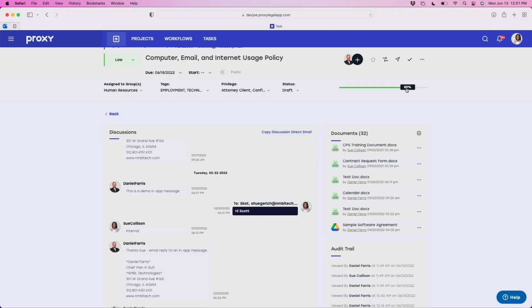This is because we want someone or some group to take responsibility of it and to shepherd it through to completion of that individual task. And then here is simply a slider which shows how far in the process that individual user indicates the task is relative to completion. So here you can see this task is assigned to me, I am drafting, and I say that I'm 80% complete.